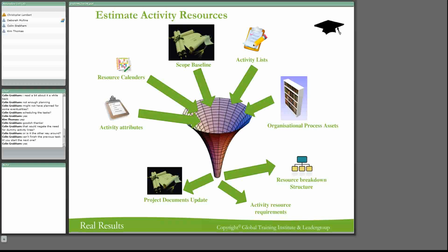Right? So from your previous process that you did, you're going to have a resource calendar. So that's going to come into you. Now, the resource calendar is important because there's certain resources that will not be available, and it's going to have an impact on your duration. Right? So let's just say that you have a contractor, and the contractor cannot start before a particular date, and he's going to have that there. So it is an external constraint that says you can't start before this because the contractor can't start before that time.